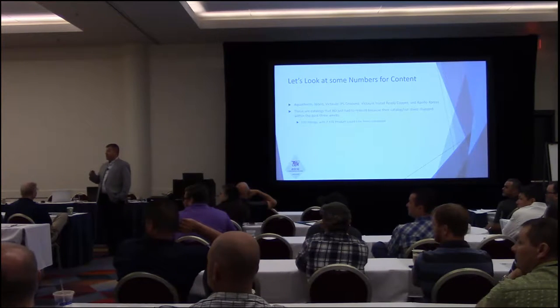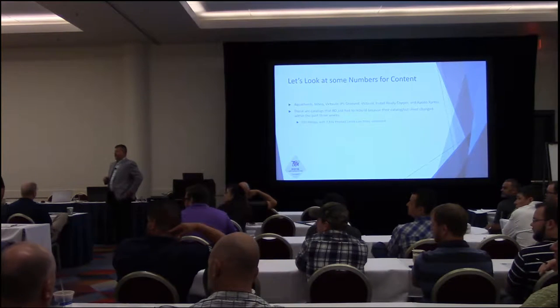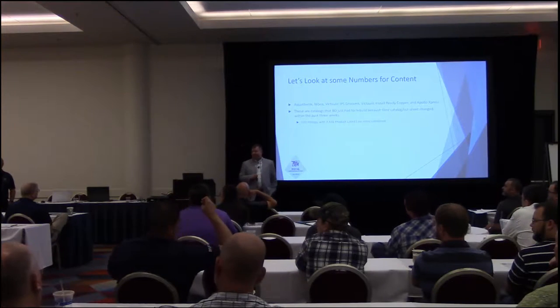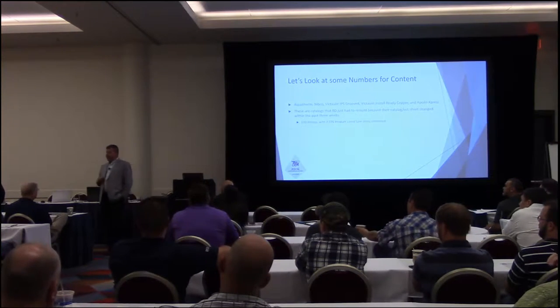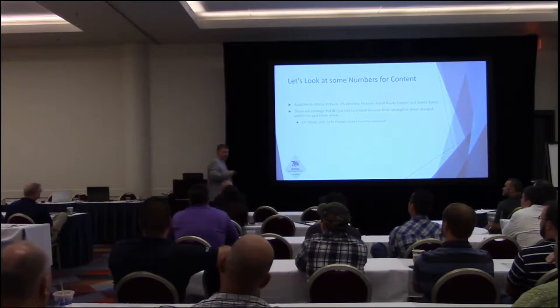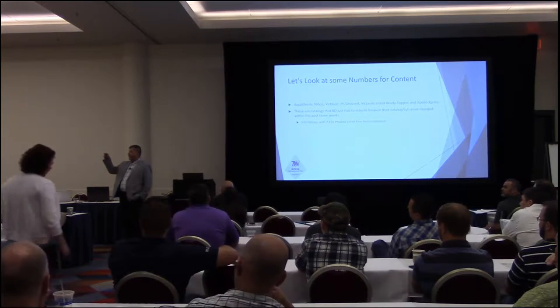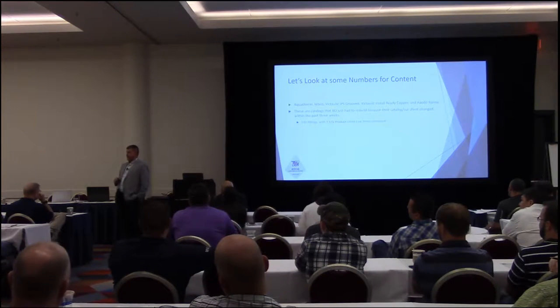Yes, sir? One of the issues we saw was when the date was changing, but they still have old material out there, so you had that funny transition of we're drawing it this way, but they're still sending us old material. How did you guys acknowledge that? Great question. So we built a new PNG for ourselves, an item PNG, the picture that goes with that item, and we put discontinued on that item, okay? Now it's up to our individual operating companies, based on their current supplier, how long will I have this discontinued item and when do I need to update to the new one? Okay? They still draw with it.